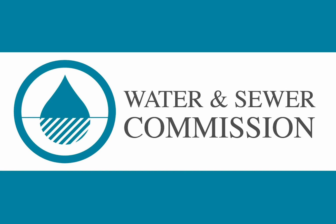Yeah, so the generator was tested. We've only had it online and hooked up for a couple weeks now, but the thought would be that if we did need an extra day with the National Grid crew, we could temporarily hook up that generator at the end of the day. Say if they need to leave for their 8-hour shift, we could hook that up temporarily for the day. We just don't want to run the propane tanks for 5 to 7 days or something while this could possibly be offline and you're going to pay more money for propane.